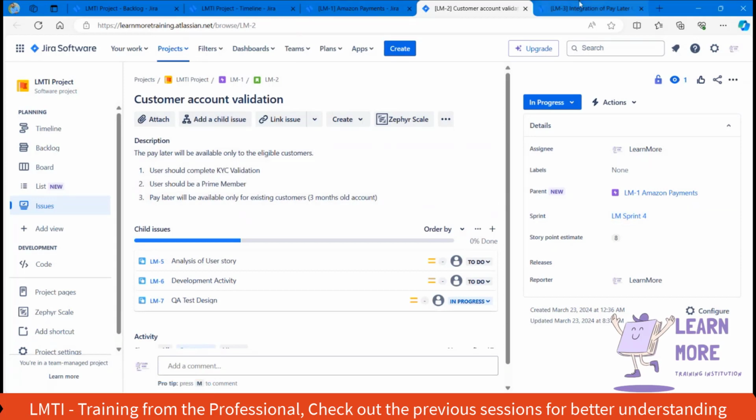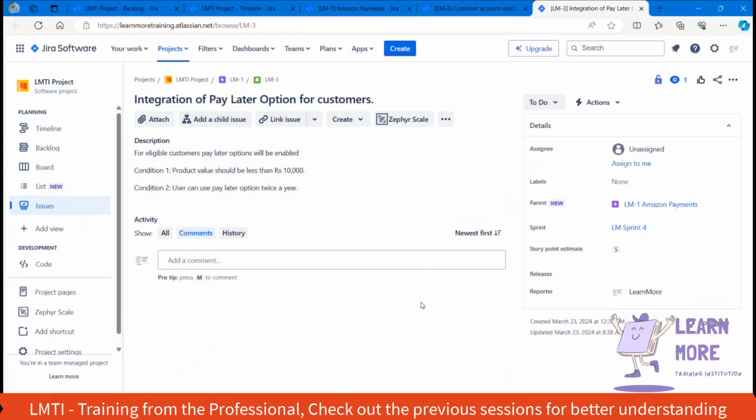Likewise, they will be explaining each and every user story, and post explaining, we will be allocating the story point and mapping the particular sprint. Now the user story will be moved from the product backlog to the sprint backlog. What is meant by sprint backlog? Whatever user stories are planned for that particular sprint, and the sprint is also called an iteration, we call it a sprint backlog.